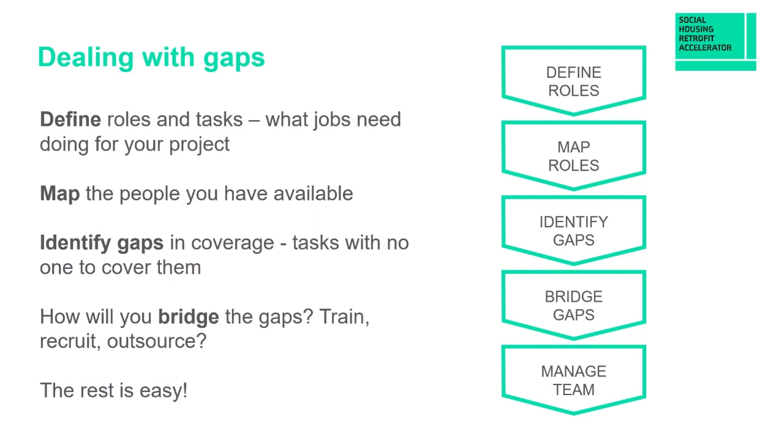And some key activities, like the Retrofit Coordinator, which is a required role in PAS 2035 compliant projects, you can share across a number of people. You can share the procurement. Each member of the consortium can work where they're particularly strong and help the others. So it's certainly something to think about at an early stage. Look around you, look at nearby social housing providers, look at what they're doing. Can you work together?